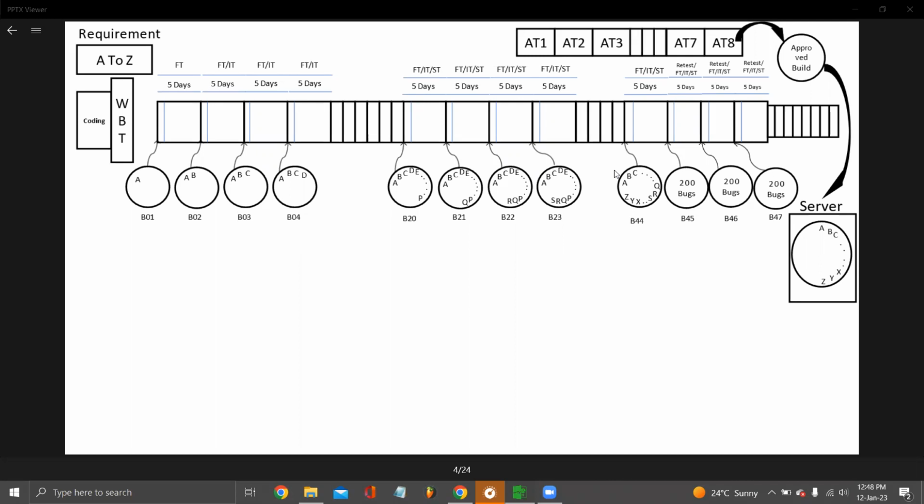So they can have different scenarios in the acceptance criteria, but if your defect count in the final build is higher than the acceptance criteria, you need to do some rounds of fixes and make this number of defects well below the acceptance criteria.